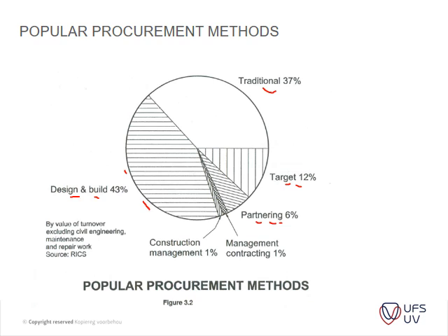Maybe the architect and the contractors, let's say, will be allocated a certain amount of profit after the project is done. Then you've got your management contracting, where basically you're appointed as a project manager, and then that project manager appoints a contractor that does a design and install, although there's a certain amount of management from the client side, reaching certain targets or so.